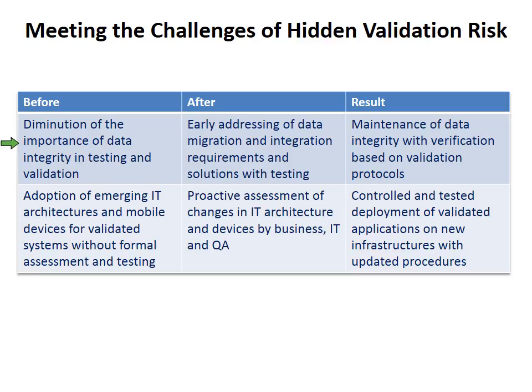This is a very common thing we run into all the time, where the data integrity, migration, and integration is thought of as a backroom technical issue, when in fact it becomes front and center when you're trying to go live. So we recommend that you address this as early as possible. In fact, one of the first things that should happen when someone gets a project approved that's going to replace the legacy, let's say, clinical trial system and move to a SaaS-based system, someone should be sitting down and saying, how are we going to handle it?